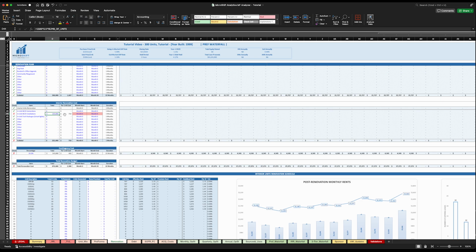the complete installation. Let's say this takes us about 3 years to complete this process, and we plan to start in month 6. It's nothing urgent, and our goal is to wrap this up by the end of the 3rd year. Once again, the analyzer evenly distributes that renovation budget on a monthly basis over your renovation duration plan. In this case, 31 months, so 225 divided by 31 months.